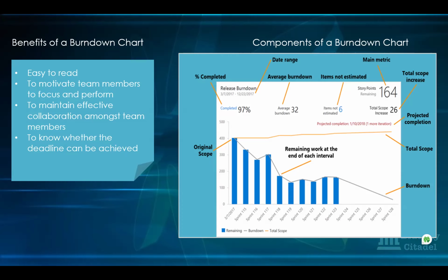And as a Scrum Master or ADM or APM also, there are times when you're looking at the board, you're not able to see really where the issue is, but your chart would show you what is going on the board. It gives you projection and it shows you what is going on the board. If you have 2 to 3 days that are flat, you're able to go back to the team to say, we're not closing any story or any task. What is going on? Do we have any impediments?